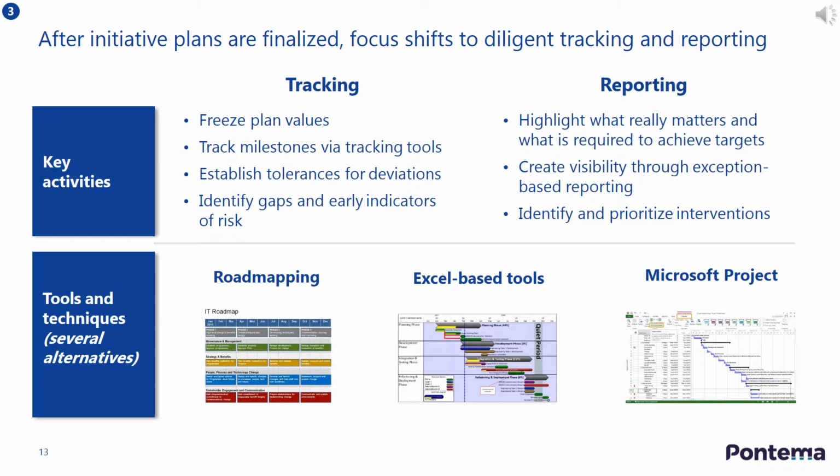When a change program is about to launch, it is good practice to host a launch workshop with the steering committee, initiative leaders, and the PMO. Here, participants would review the program vision, the aggregated impact of all initiatives, and discuss any potential risks and how to mitigate them. This is also an excellent opportunity to reinforce the senior leadership team's focus on the program.